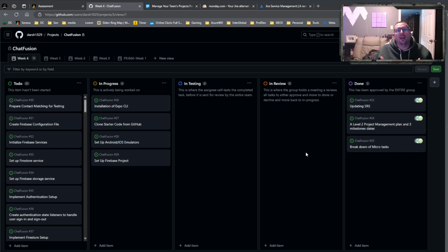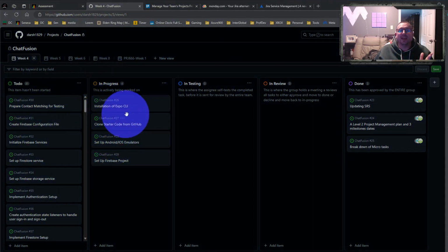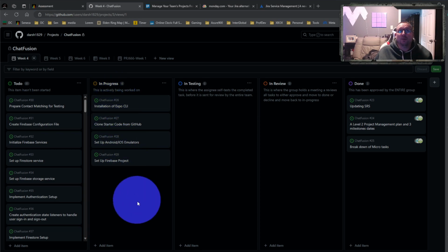And so that's sort of the idea: does this fit in with what I'm doing, or do you foresee a conflict coming up here? Then you need to have that discussion now: okay, who's changing? How are we going to collaborate here so that it's going to work together? So through that review process, if something doesn't look right and it's declined to be approved, it actually moves all the way back to in progress again. Okay? So we move it back to in progress again.